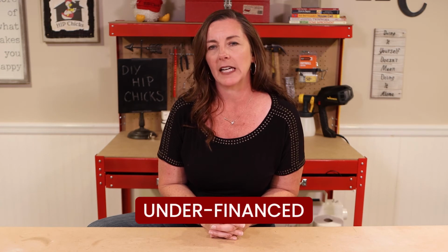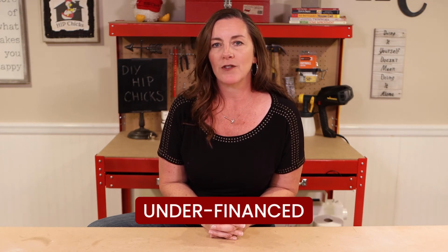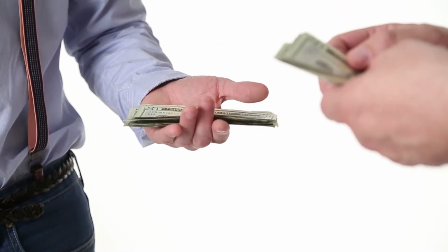So let's start with the first one, which is underfinanced. That means when your contractor is starting your project and he comes to you and the project is, say, $12,000 total, and he's asking you for $8,000 up front, whoa, red flag. That means he does not have enough money on the books to possibly pay his employees and to get material started. So it's important that you expect to pay about 15 to 20% as your deposit. Do not pay more than that.